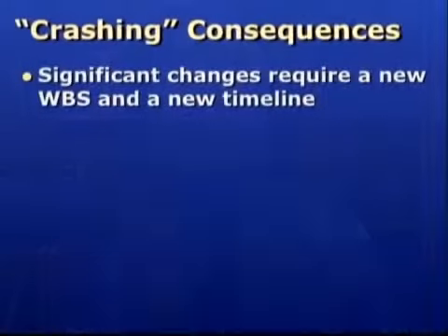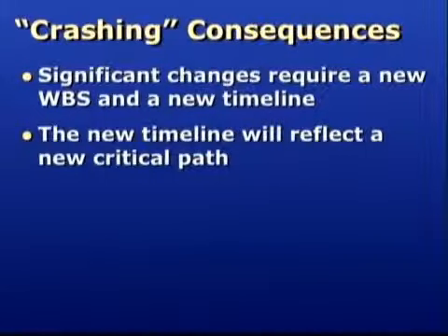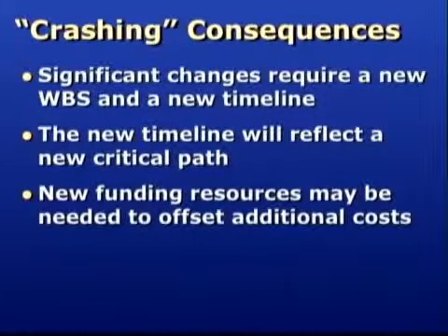The result of this project change will produce a new kitchen a few weeks ahead of the original schedule, a peaceful relationship within the extended family, and a great meal instead of a fast food meal on Thanksgiving Day. This is a significant change to the project. It requires an adjustment to the work breakdown structure that will produce a new project timeline. The new timeline will reflect the removal of a few tasks, the addition of several more, and a new critical path for the project. It will also require providing additional funding resources.